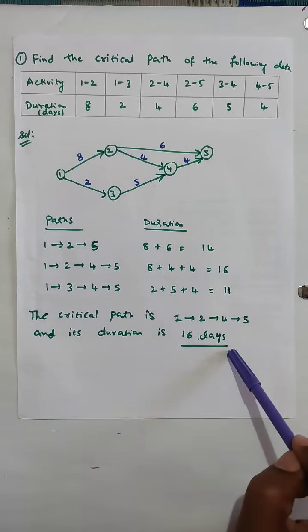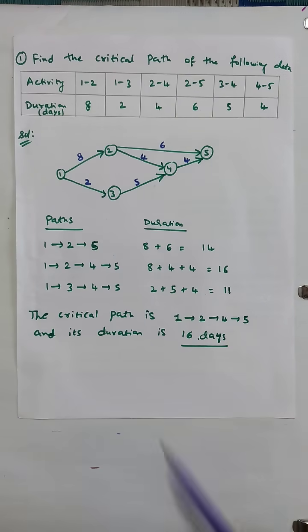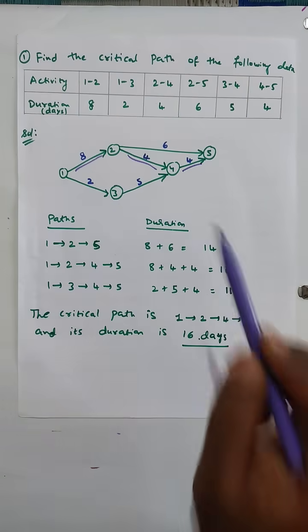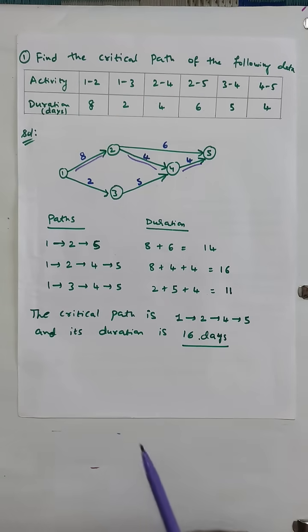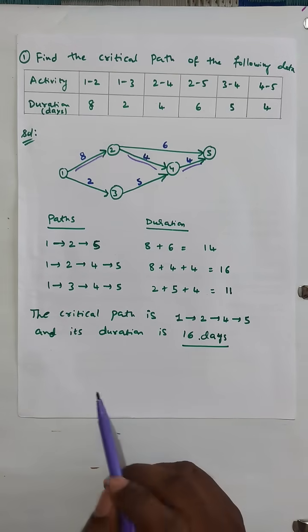So 16 is the project completion time and the path 1-2-4-5 is the critical path. This path 1-2-4-5 is the critical path of this project. The critical path is 1-2-4-5 and the project completion time is 16 days.